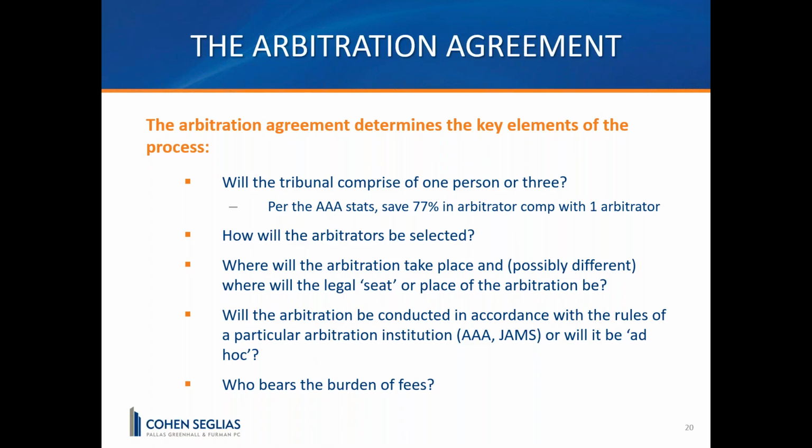The same issue comes up with the law that the arbitrators are going to apply. Basically, the statute I was just talking about also governs which law would apply, which is the law of the state in which the project is located. But the parties can jointly agree to have the arbitration really anywhere. If one party disputes that, though, that's when the issue arises.